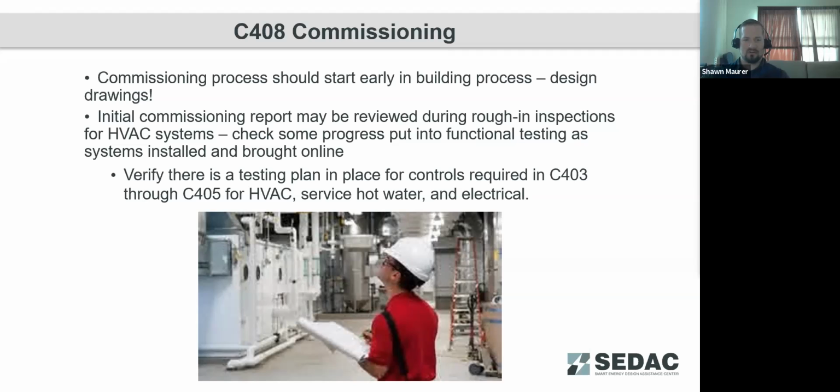Once things are installed and they're working and you're getting towards your final inspections for the facility, now you're looking for, was that initial commissioning plan completed? Was there a plan for how to address the deficiencies? And are those deficiencies now being corrected as the building is getting close to handover to the building owner?